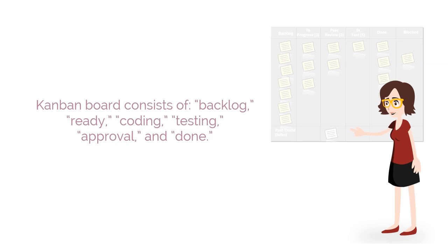These boards can be customized to meet each organization's unique requirements. Each task moves from one column to the next per the described flow of the associated component in the system. The key principle is the visibility of the workflow, and policies that are in place. This practice helps improve communication, predictability, and problem resolution. The second principle is limiting work in progress, or WIP.